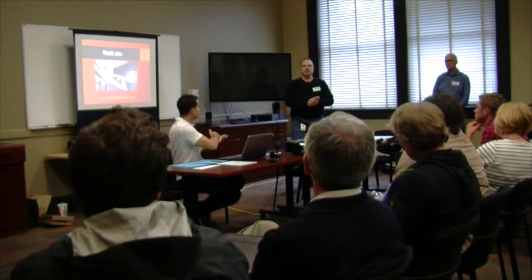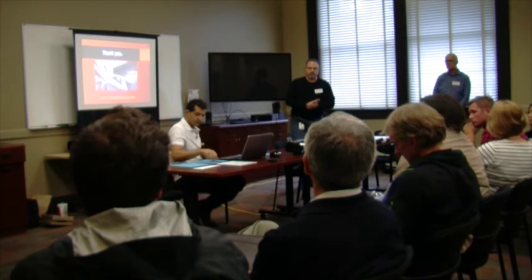And can you tell us a little bit about the... Sure. So they're all subject to the same ratios that we talked about earlier as far as apprenticeship utilization, women and people of color goals. So that is project-wide for all crafts. Each craft's workers are represented by a different union and would be dispatched through their respective craft unions. So if they were an iron worker coming on the project, they would be dispatched to the iron workers hall. If they were a plumber, pipe fitter, through the plumbers, pipe fitters union hall. But everybody, all the apprentices and such, are the same ratio.